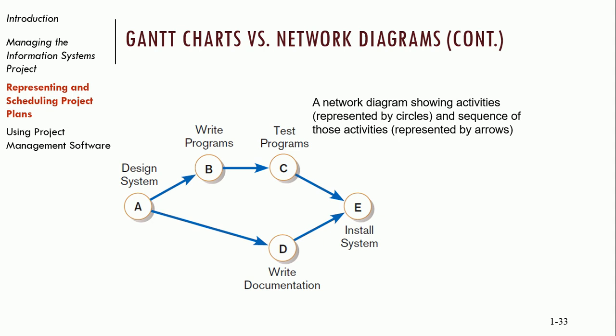The next step, after we have our list of tasks, you're basically going to take each one of those tasks and put a little bubble in some diagramming software. I'll show you how to do this with draw.io. There's also a free product online called TeamGantt you could use. You put a bubble for each task and determine which one is the first task — say task A is number one — and then, once task A is done, what other tasks can I begin?